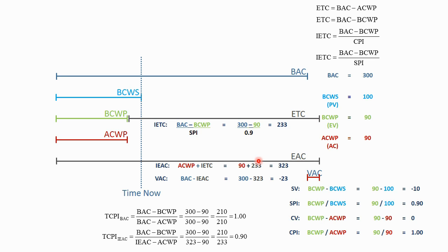Schedule, there could be a number of reasons why the project's not on schedule, and it might not help to add 23 hours of budget to the project. There might be some other reason it's behind schedule. If it's purely a financial reason, then this is somewhat reasonable, but it's not a calculation that I would necessarily recommend. Nonetheless, I wanted to show it to you because it is one of the methods for computing estimate to complete.